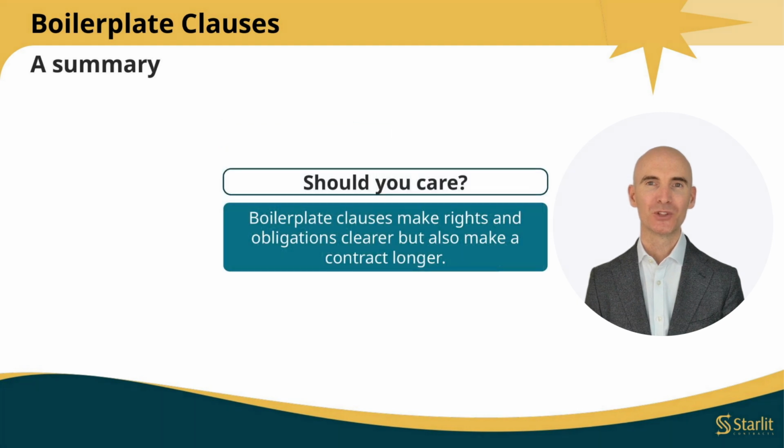Is this something that you should care about? Well, a bit like all clauses, it really depends if you need the clause during implementation of a deal. But since we can't look into a crystal ball and know what the future will hold, the inclusion of boilerplate clauses generally does no harm, provided they follow the standard language. Now keep in mind that if you remove a boilerplate clause during the negotiation phase and then want to introduce it later through a contract amendment, then that could be a lot harder. You will not necessarily be able to add the clause later unless the other party agrees to it.